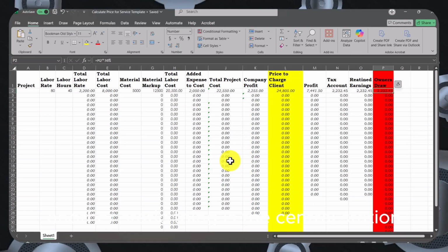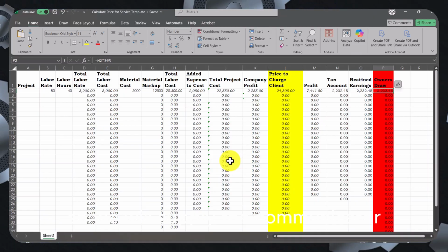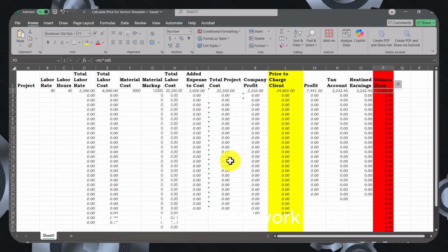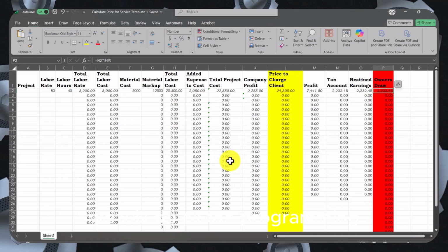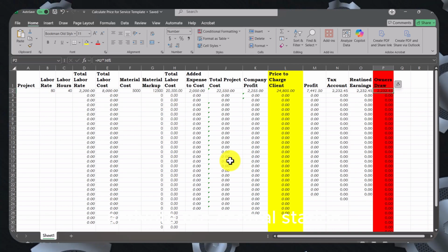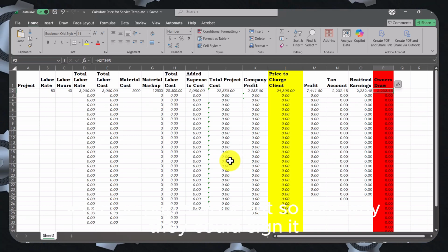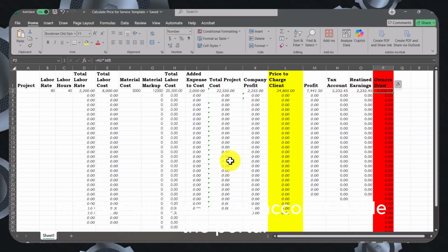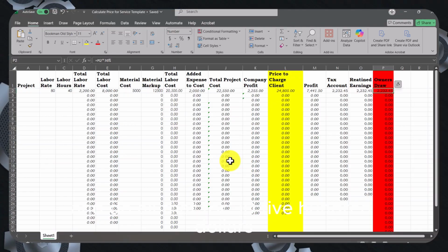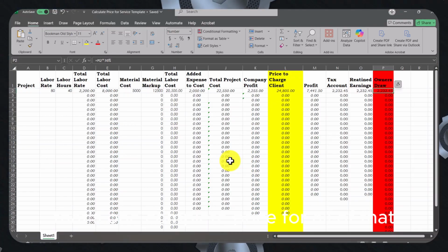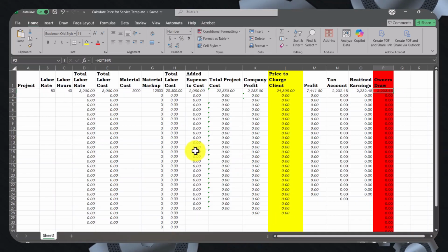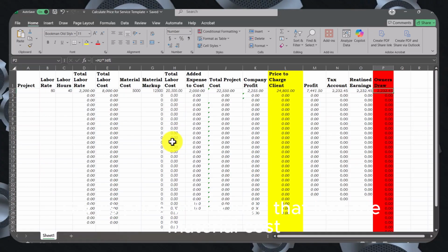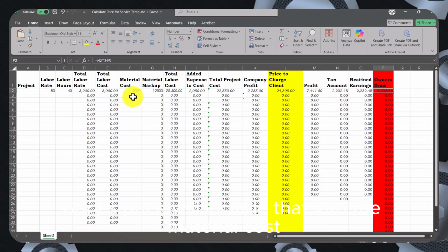So once we do that, another static thing is the central station. We will supply the communicator, install the communicator, run the network cable, hook it up to the fire alarm panel, do all the programming, activate the central station, and send the paperwork out so they can sign it, and there's a process for that too. Then we will create the account inside the portal, activate it, test it, and do all of that for $3,500. That's one complete price for that entire process. So once we have the $3,500 and the $5,000, Gary's price, we'll include that in the material cost.